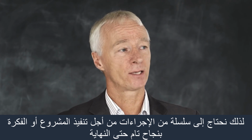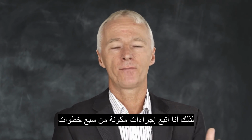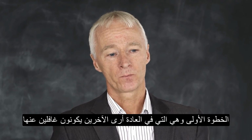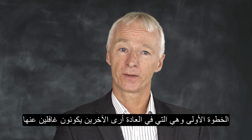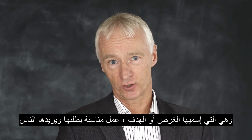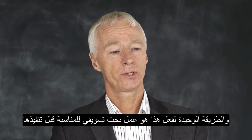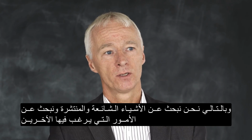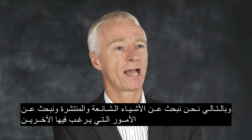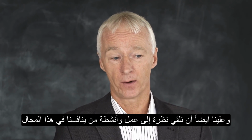So we need a process that takes an idea all the way through to completion. So I have a 7-step process. So my very first step, and one I often find that people kind of forget about, is what I call purpose, creating events that people actually want. And the only way to do that is to do a bit of pre-event market research. So we're looking for desires, we're looking for trends, we're looking for things that actually people want. We also need to take a little peek at the competition as well.